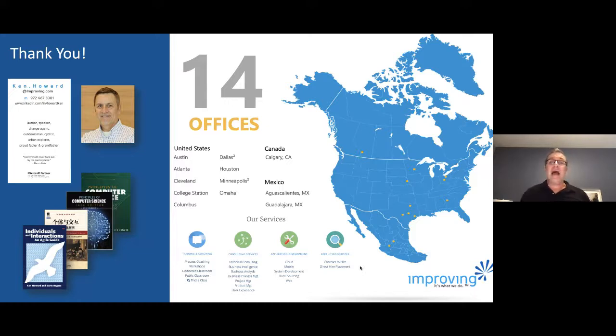So after you deploy something, you have to anticipate having to budget time for ongoing maintenance and bug fix, but you have to also determine as you triage those adjustments, which are high priority and which are things that people can live with, because the more time I spend on maintenance, the less capacity I have to work on ongoing development. But if there's high business value that's sitting on the table undeveloped because I'm so busy maintaining the deployed application, then the business might look at investing more in this particular team so I can get more product out.